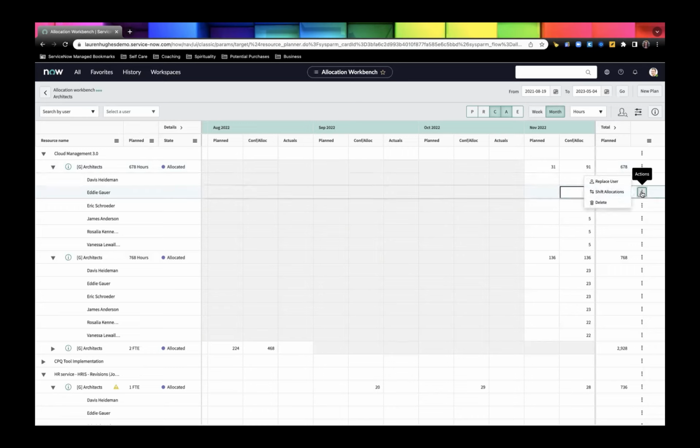All right, and then again, availability takes into account the allocations that you are already allocated. You reduce your availability. Your time off will be deducted there as well. So if you have time off, if you allocate to projects, your availability will be lower than your capacity. If that makes sense. So do we need to create a special resource plan to reduce my availability? Or for PTO, you can use the operational resource plans, or you can use the calendar as well.